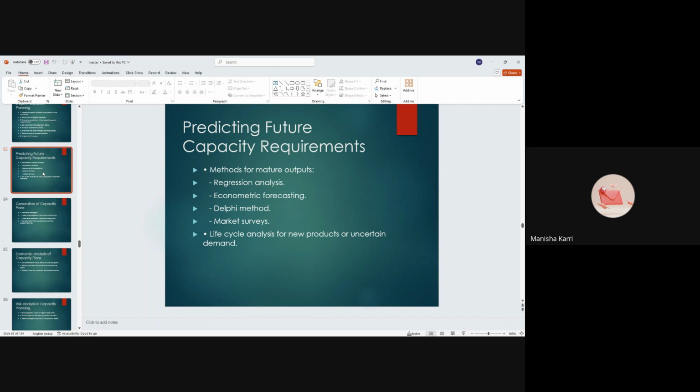So the next one is the Delphi method. What is this Delphi method? It is a structured way to gather insights from experts through multiple rounds of surveys or questionnaires. After each round, the results are shared with the group, and the experts adjust their responses based on the feedback, leading to consensus. This is particularly useful when historical data is limited and expert opinions are needed to predict future